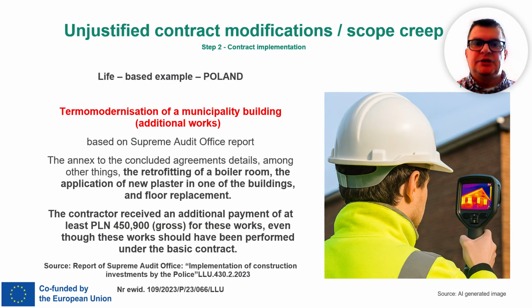So now, please let me draw your attention to another interesting example. It's a real-life based example from Poland. A contract award procedure was announced and the contract was signed for thermal modernization and modernization of the police headquarters facilities. According to the Supreme Audit Office from Poland, as they controlled this area, when the municipality building was being modernized, some additional works were added on through an annex to the original agreements.